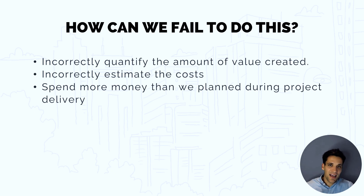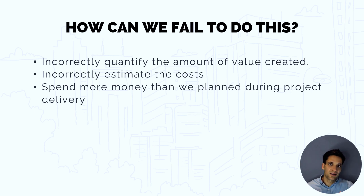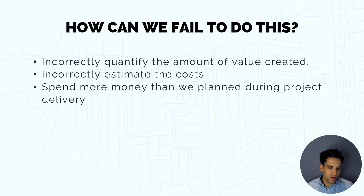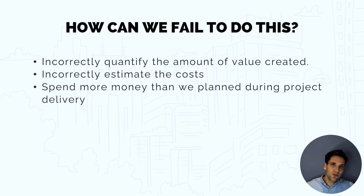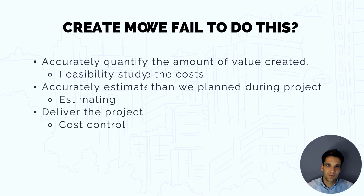We can also incorrectly estimate the cost of delivering that value — incorrectly quantifying how much the project is going to cost. And then, once we move into project execution, we could be wasteful and spend more money than we originally planned. So those are the three ways we can fail to deliver on the outcomes of project cost management.